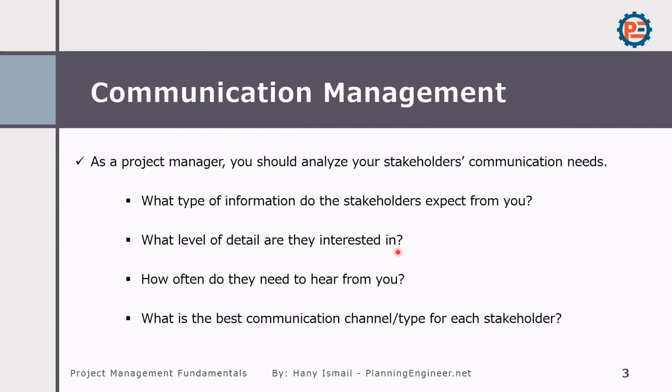If you are sending a report to a senior manager, don't put too much detail in it. While if you are creating a report for a site engineer or maybe even a foreman, you need to give him only the details he is interested in. Also, you need to know how often you need to hear from or send to your stakeholders, and what is the best communication channel or type for each stakeholder. This is the backbone of communication management.